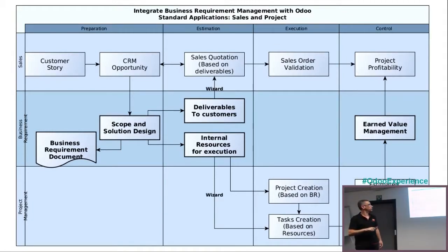And what's more important is that now we can link directly the estimation that we had initially in the business requirement with the timesheets that we will input in the system. So in the end, we can compare what was the estimation originally given and the time actually spent.